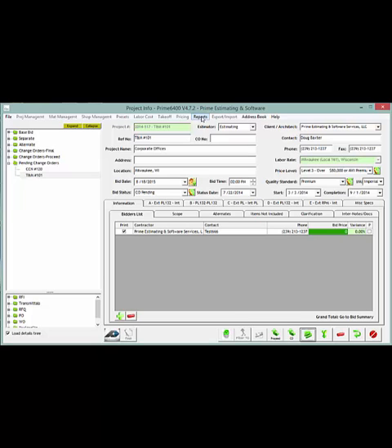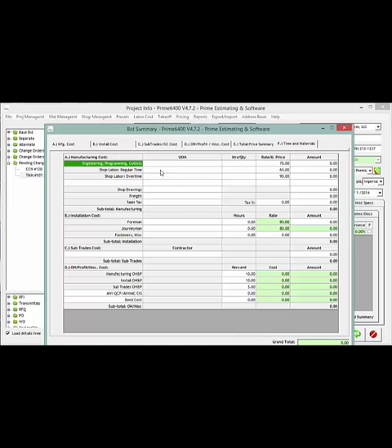And from here we're going to go in and do our base bid summary. From the summary we're going to come in and complete this area here with information. So we've got maybe 8 hours of engineering, we've got 12 hours of fabrication, we've got a few hours of overtime, we've got a shop drawing cost that we can fill in, freight factor if necessary, sales tax if that is of course applicable, and then we can complete the requirements for the site labor and possibly fasteners if we're required for this.